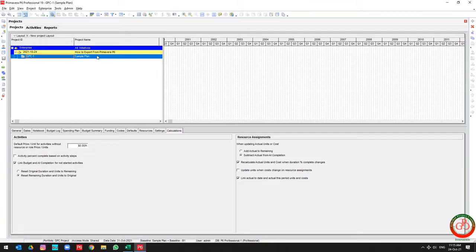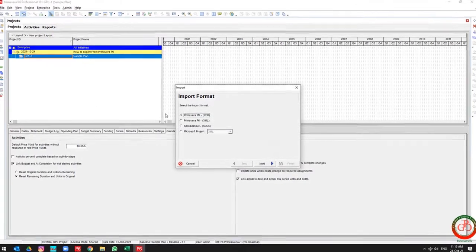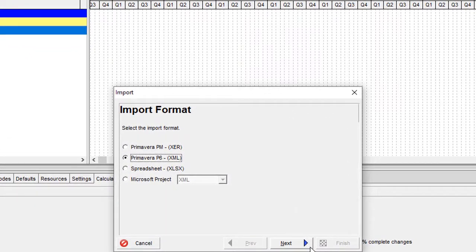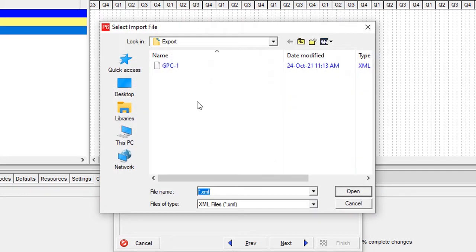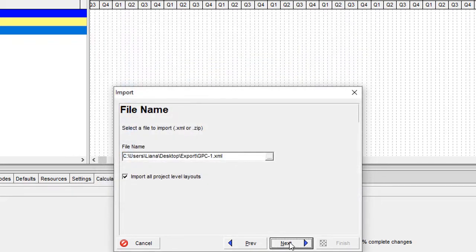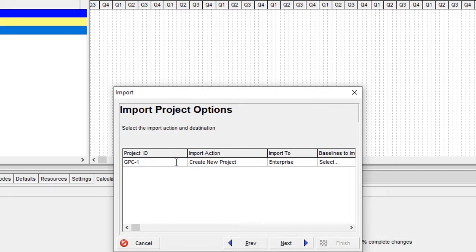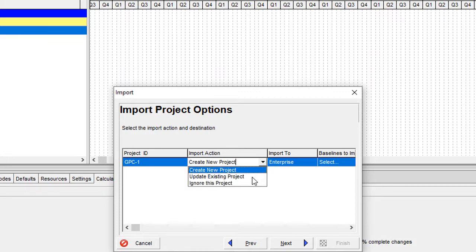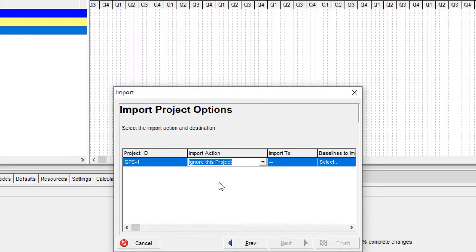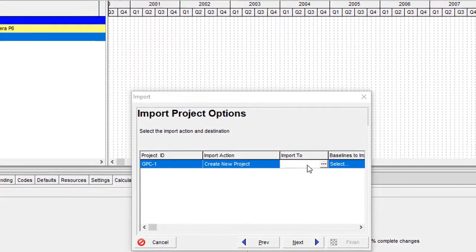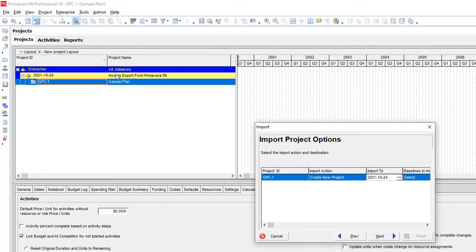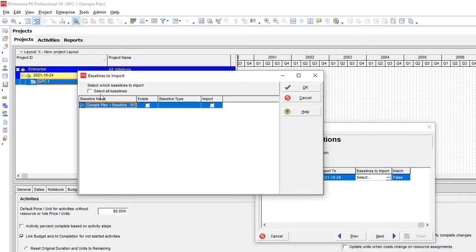In this case I'm not going to add any extra project by using import, but you also have the option to import Primavera P6 by XML. You need to select the XML file. I select the export folder and only this project appears. You have some options here: this is my project ID, this is my import action. Again I can find options to update existing, ignore the project, or create a new one. I can select where I want to import it to this EPS. If you want to import baselines, you can select how many baselines you want to import.